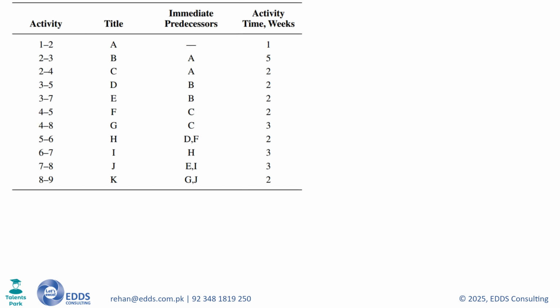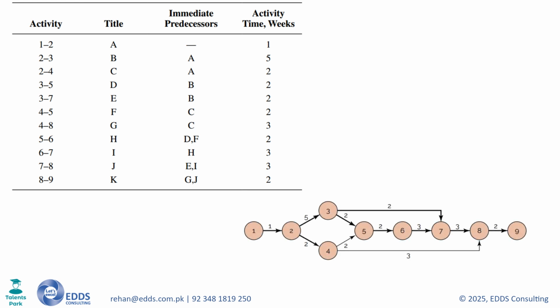This table shows the sequence of events in a project. Large projects can be easily converted into PERT networks once a few simple questions are answered. First, what job immediately precedes this job? Second, what job immediately follows this job? And third, what jobs can be run concurrently? These questions help define the sequence and flow of work, and that's all you need to start building the PERT network. The figure on the right shows a typical PERT network.